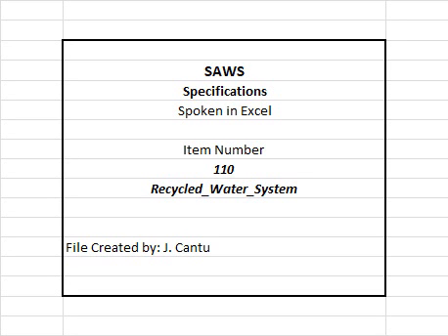110.1 Description: Any work done on the existing or proposed recycled water distribution system shall be accomplished with the SAWS standard specifications for water, except as otherwise noted. All proposed contract documents must be reviewed and approved by SAWS backflow prevention personnel prior to the start of any work.